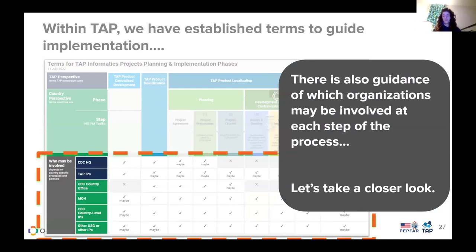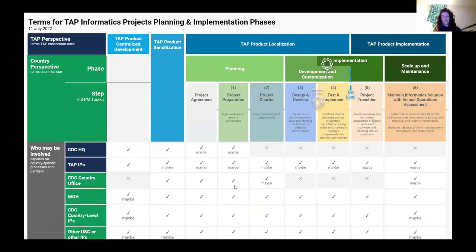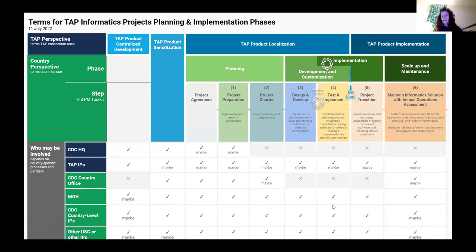There's also guidance on which organizations would be involved. Recognizing that if you have different stakeholders involved in your electronic health record planning and implementation, different folks are going to be needed at different times. This is a high-level overview — maybe CDC headquarters is involved at the project agreement, but more likely it's the ministry and country offices. So at a high level, it can show you who's involved when, and at which stages of the implementation.